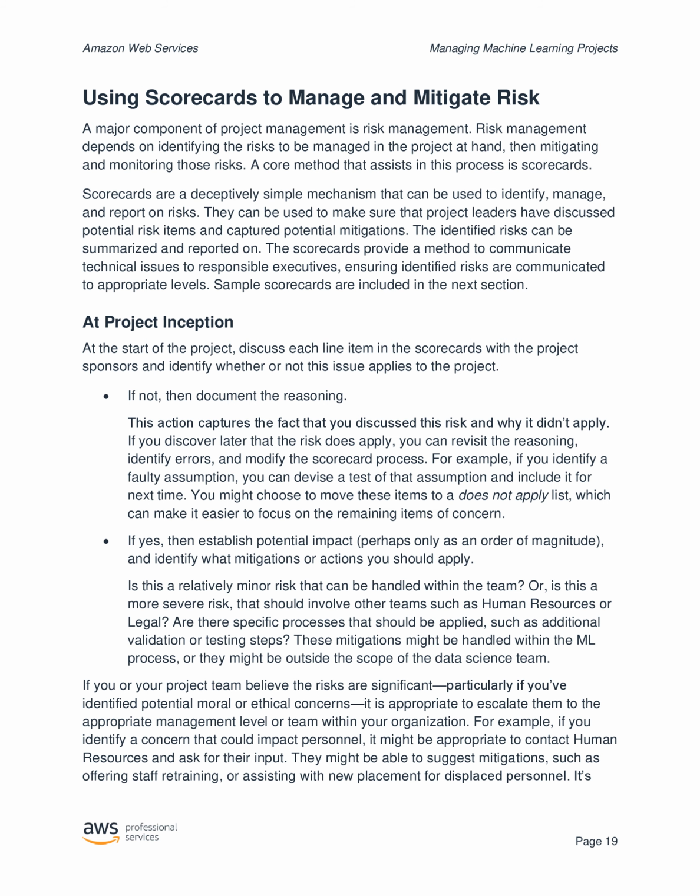process. For example, if you identify a faulty assumption, you can devise a test of that assumption and include it for next time. You might choose to move these items to a does not apply list, which can make it easier to focus on the remaining items of concern.